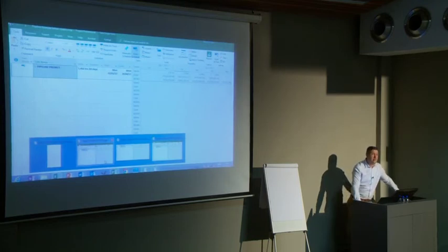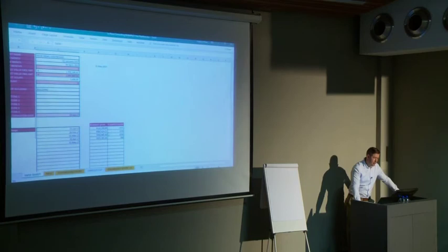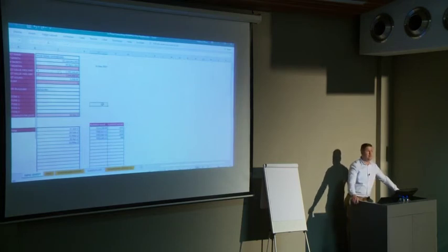55456. Because I've resource loaded my schedule, that's again an automatic value that I get. Those are the man hours that will be worked on this site. So I just punch that in, and there are my values, that 114453, everything. And this now adds up to the total, the project value. And remember now, this is cost. So back to earned value principle. It's cost. It doesn't include any profit or VAT or anything. Because we want comparable units, so I need to just have the cost, and I'm going to measure the cost as we go.